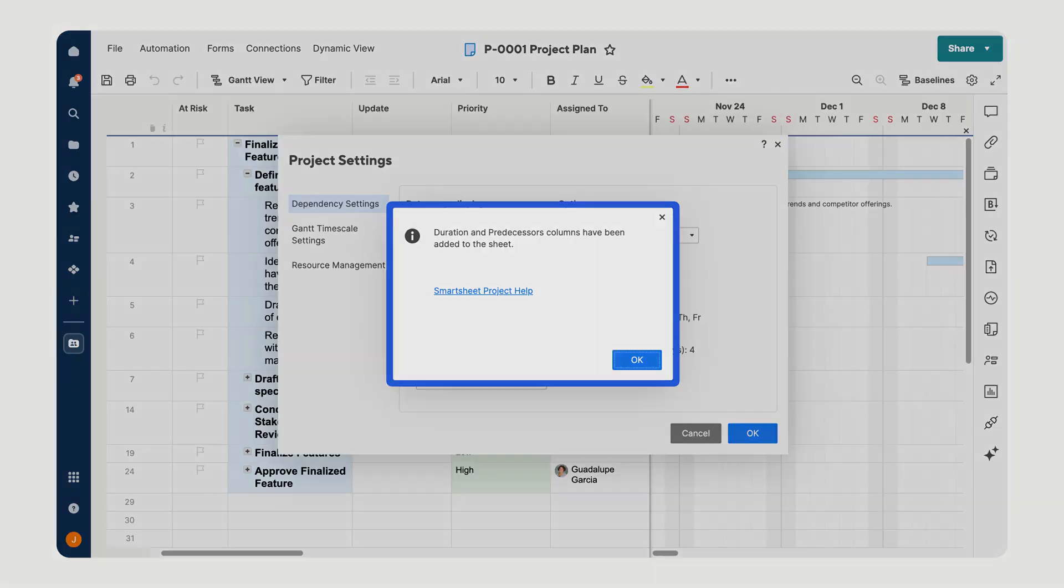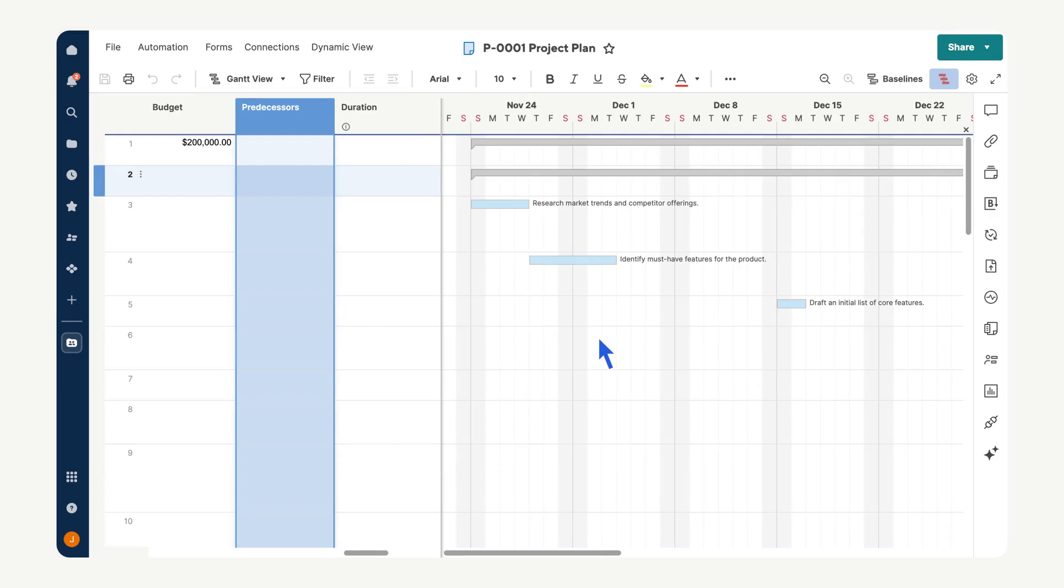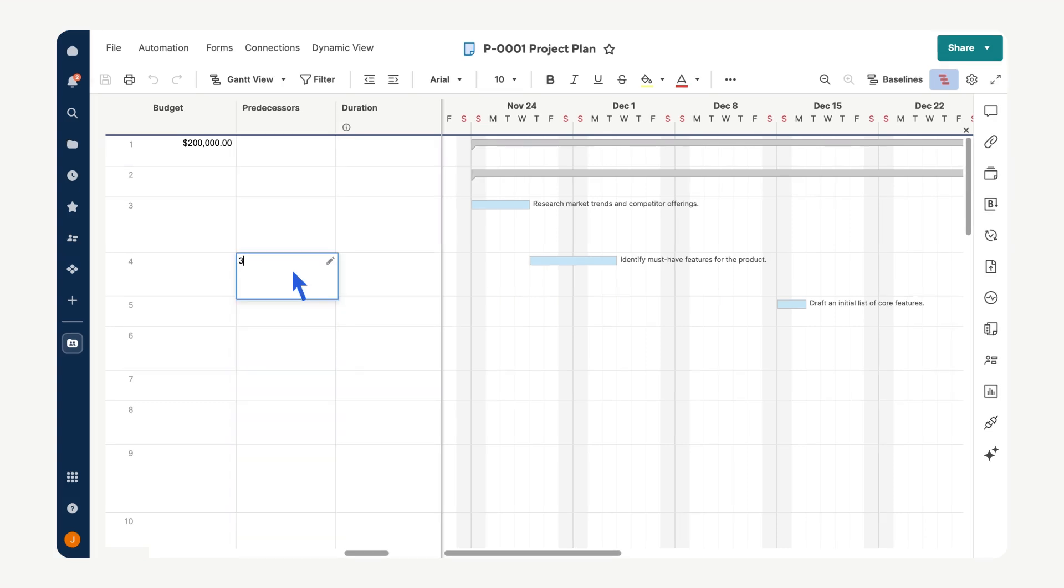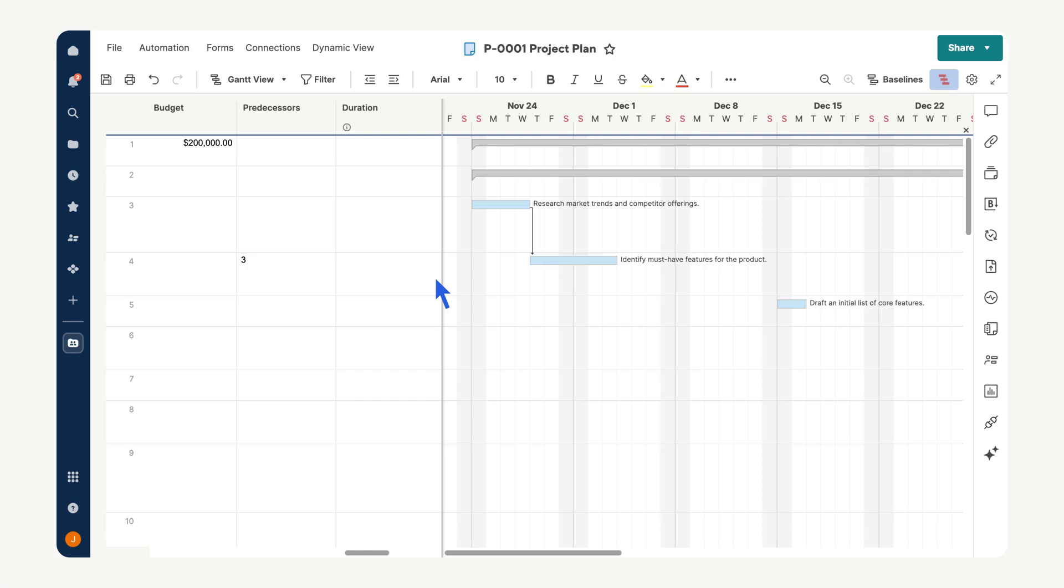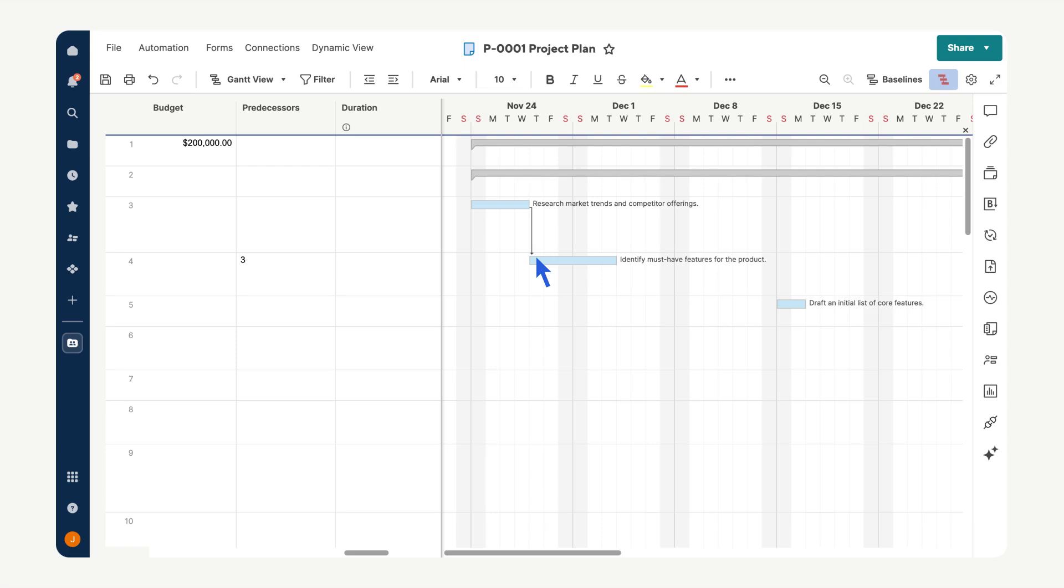Predecessors allow you to define relationships between tasks. Each predecessor represents the row number of the task it depends on. For example, if the task in row 4 depends on the task in row 3, you would enter 3 in the predecessor's column for row 4. After pressing enter, notice that an arrow appears in the Gantt chart connecting the task in row 3 to the task in row 4. This visual indicator highlights the dependent relationship between the two tasks, showing that row 4's task cannot start until row 3's task is completed. Alternatively, you can create a relationship directly in the Gantt chart by clicking and holding on one task bar, then dragging your cursor to another task bar to draw the connection. By default, these relationships are finish-to-start and are critical when setting up timelines, especially for work back schedules, which will be discussed later.